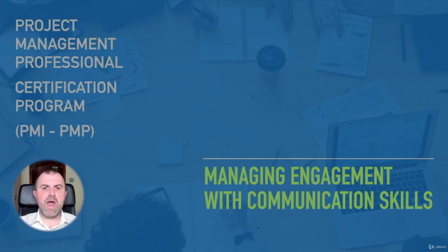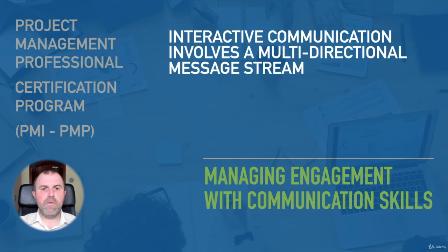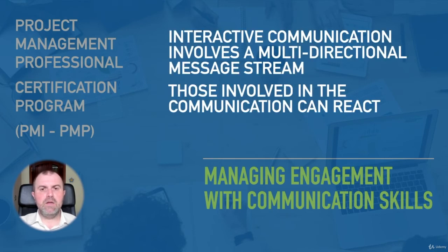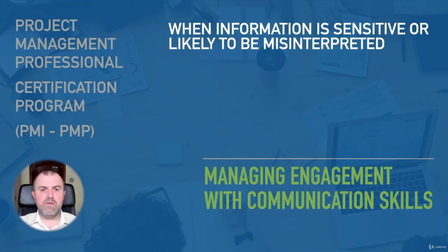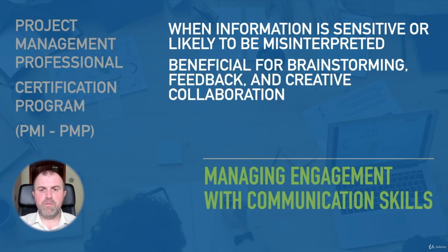Interactive communication is when people can react and respond to each other in real time. Interactive communication is appropriate when an immediate response is required and when information is sensitive or likely to be misinterpreted. It is also beneficial for brainstorming, feedback, and creative collaboration.